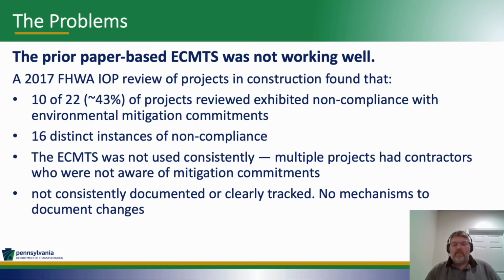Cemetery access that was closed that we promised to keep open. Exclusionary construction fencing around wetlands that was not installed and was not actually depicted on the project plans, even though we promised to put them up. And a recreational trail that was closed, even though we had promised to keep it open. These are some of the examples that were found.